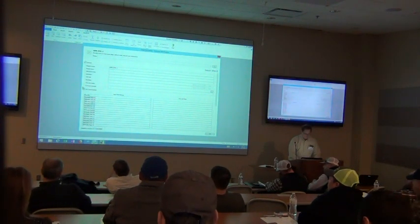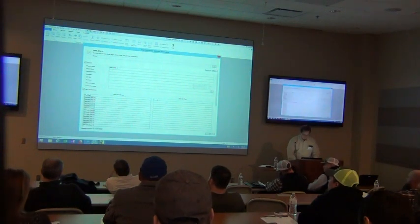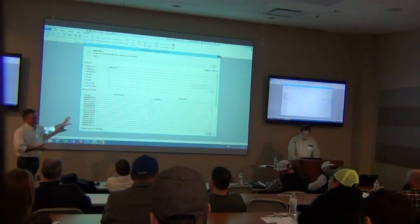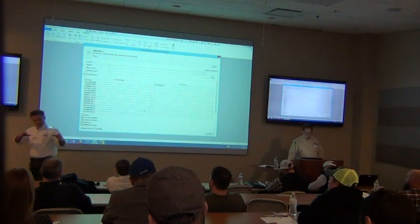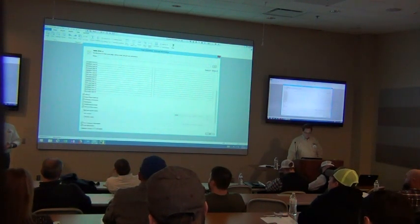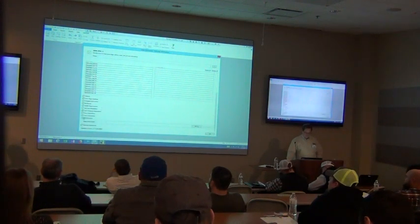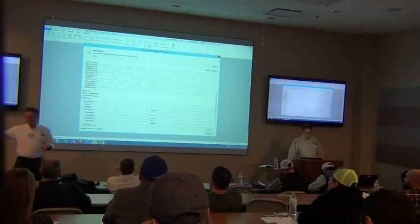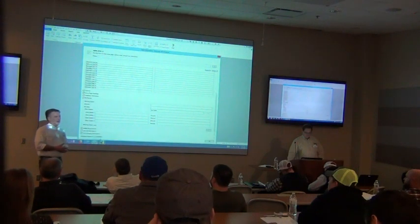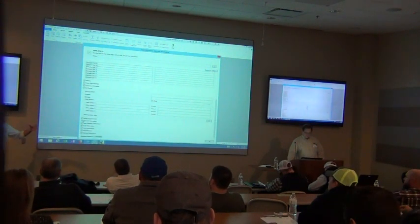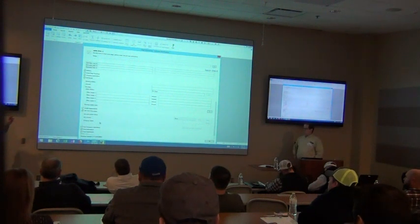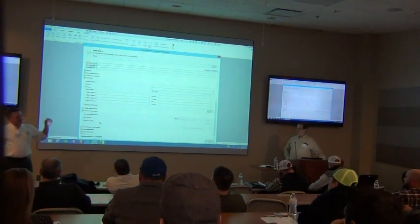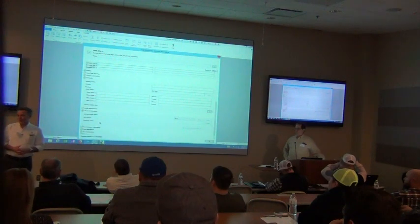You might also want to put in things like the square footage of this project or how many stories it is. Depending on your management system, you can then look at what profit margin you typically put on a 5,000 to 8,000 square foot project versus a 10,000 to 40,000 square foot project. You can start looking at information from a bigger view — it's like mini big data, focused on more than just one particular project.